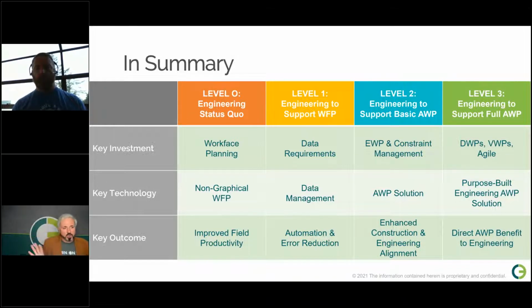So if you have all this data connected inside the tool, now when I select a component to add to my installation work package, I automatically create my rules of credit, automatically create my quantities, and automatically create all of the information around this based off of the attributes of that component. So that attribution allows you to do that automation. That automation reduces effort, makes your work-based planners more efficient, and reduces errors.